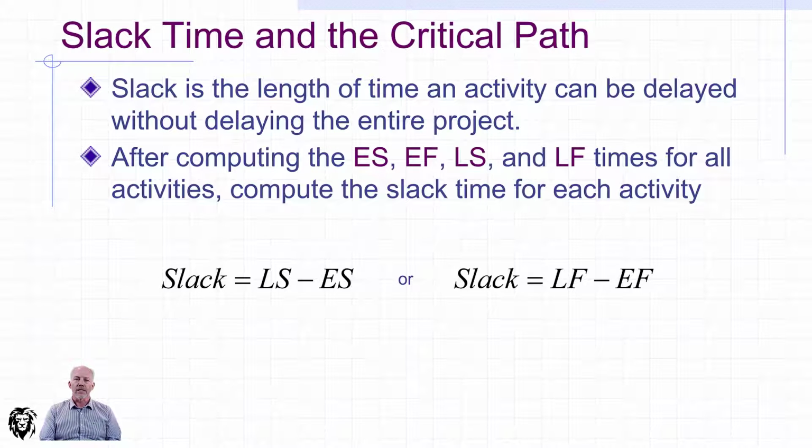So what we need to do is compute the slack, and we can do that one of two ways. It's either the latest start minus the earliest start, or the latest finish minus the earliest finish.